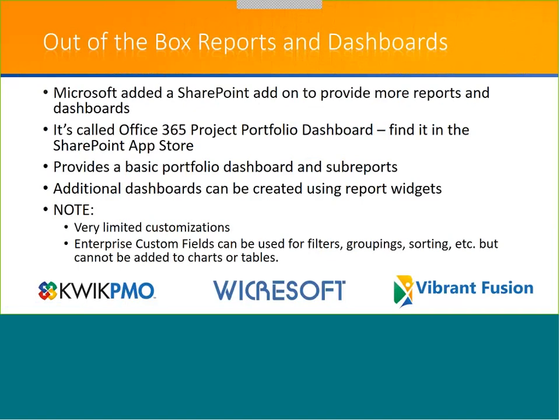You can also create additional dashboards. It's kind of templatized. You can use some different report widgets. One thing to note is it's pretty limited with the customizations. They can only anticipate so many customizations that a customer might make. You can use enterprise custom fields for your filters, groupings, sortings, but you can't add those fields that you've added to a chart or to a table that might be in these particular dashboards.